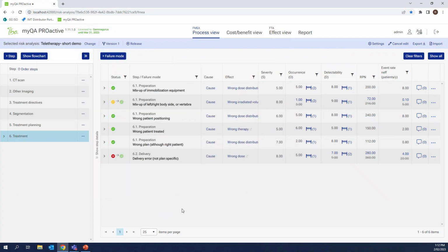Once you punch all these numbers in, we've got our severity up in our main area of the table, the severity, the occurrence, and the detectability, and then RPN. So the RPN is just the product of these 3 numbers. So it's a number from 1 to 1,000. And this number by itself is good as a relative measure. As you could tell, a 900 is a bit more intimidating than a 112.